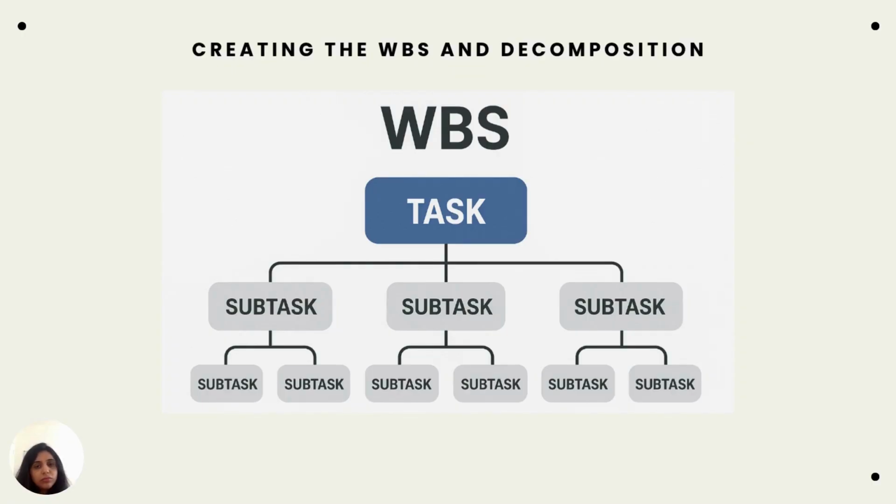Now, the WBS is a visual hierarchical diagram, but the WBS dictionary, which we also learned in one of the videos, if you remember, is the key document. It provides the detailed description of each work package, including things like its code, account identifier, and the specific milestones for the completion. You can track the WBS back from the WBS dictionary. Combined, the WBS dictionary and the WBS create the scope baseline. All right. So that's about WBS.